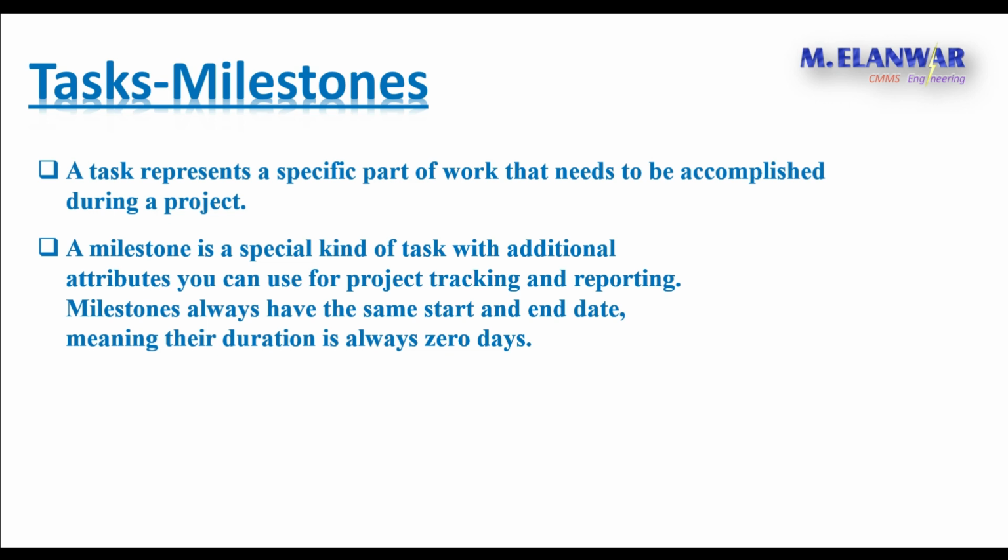Milestones always have the same start and end date. This means the duration of this task, by days or even by hours, is 0. A milestone is shown in the Gantt chart in the shape of a diamond, as we see here.